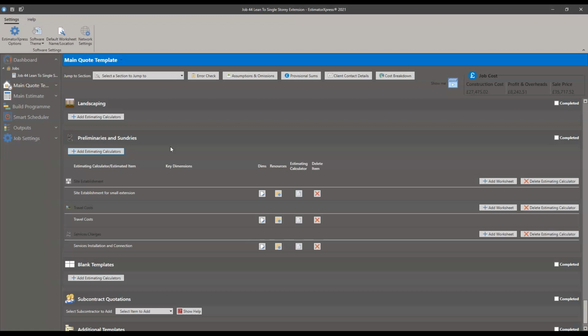Rename it like a material, say copy the pipe, call it service ducting, or you just remove it altogether and leave it as an open trench until the services are laid, and then you just finish off using the calculator, which is the pea gravel protection, concrete over the top if required for protection, and other bits and bobs, and backfill. That's how I would go about it. If you're not worried about the volume of material coming out because it's going straight back in, you could just use the drainage plant.